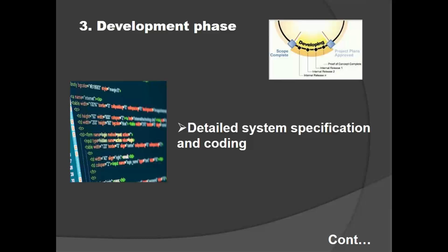So the same is going to be updated in the daily status reports. Okay, and you will be maintaining a daily status report and a weekly status report, and while going home daily, you will submit this daily status report to the project manager. Okay, so the project manager will open the status report and check whether the project is going on schedule or not.